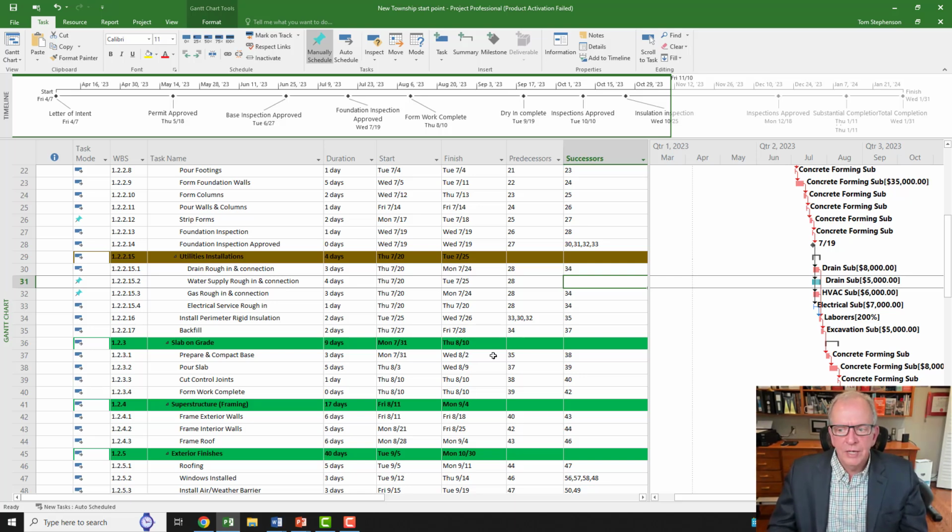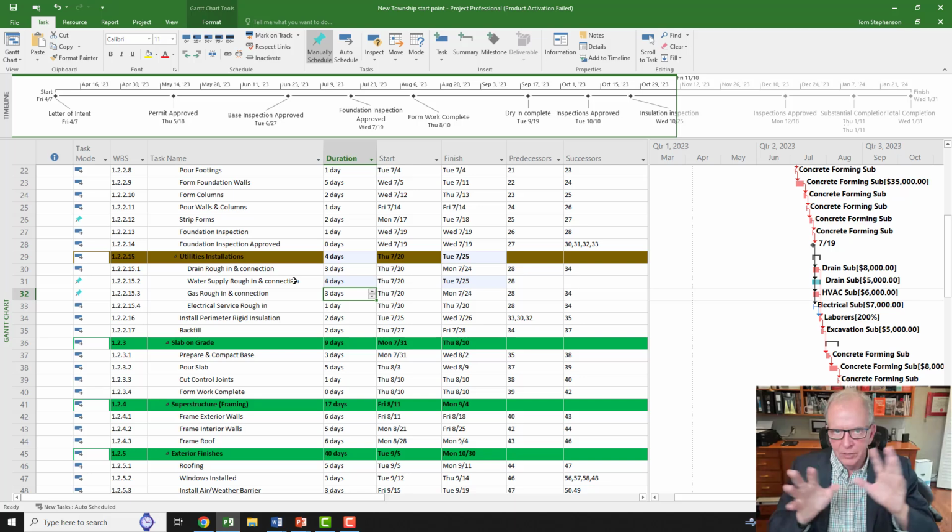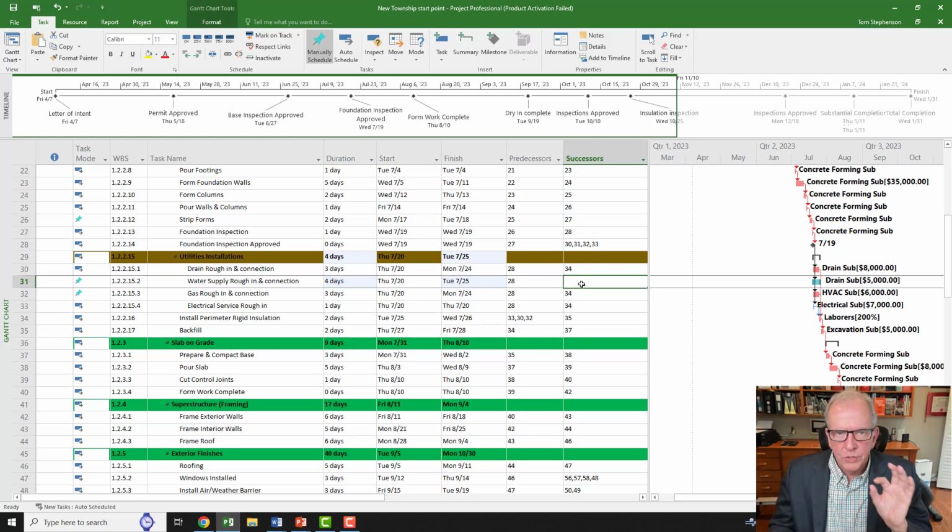If you don't have everything connected, you can't really tell when something changes, like it's not changing all your dates. It's only changing this particular activity's dates. And because it's not in auto schedule, it's not necessarily updating everything in normal manner. We usually want basically auto schedule because then things are automatically changing just as other things change. So usually manual schedules kind of got it there in a holding pattern.